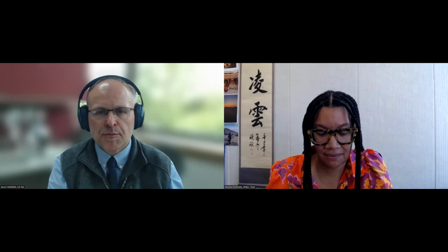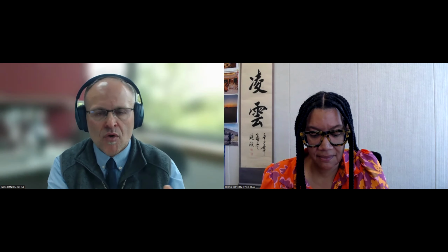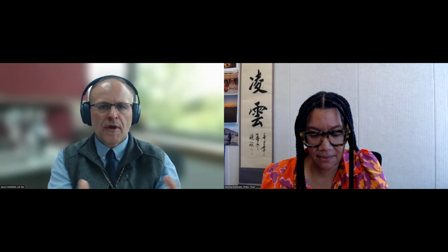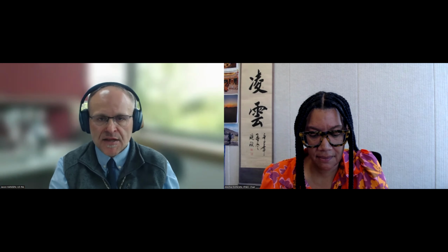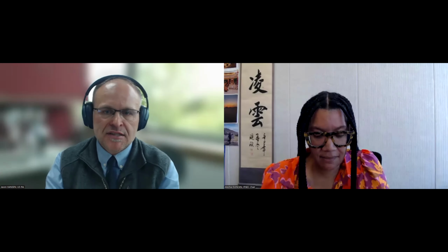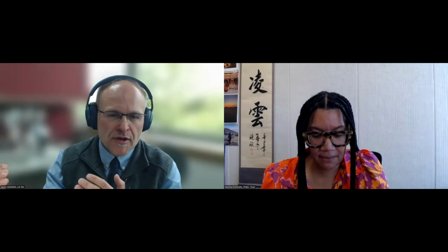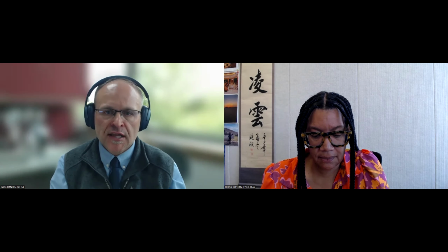You first might develop an analysis to try to answer the question, is nuclear power a good idea? Or is this something that we should be looking at? You might call that a rough order approximation. If the answer to that first rough order approximation is yes, then you will get into the very nitty gritty details of analysis moving forward, where you will understand the economic potentials in much greater detail than that first high level estimate.